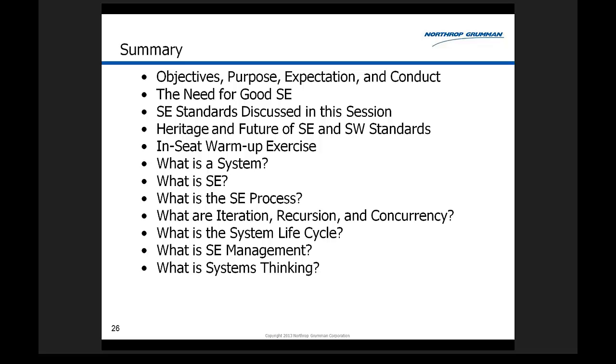And what we want to make sure we do is include quality of the product in the giving credit for earned value. Not just the fact that the product is done, but that the product is of good quality to be granted credit for completing the work. So that's my thesis on earned value. It's very, very effective. Now, the other parts of the question I can't recall. It was a question about requirements and use of requirements and so forth, design. Could you repeat the question, please?